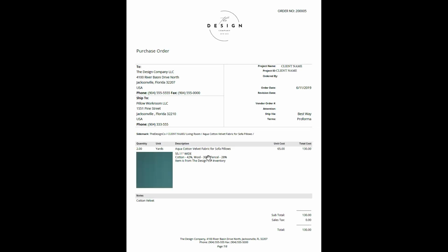Okay, so this is kind of a long video, but you can see how the paper trail of purchase orders is done. Remember, initiated by the signing of the client proposal, and then the designer has to create all the purchase orders for each material that's used in the product and make sure that it all goes to the right place.